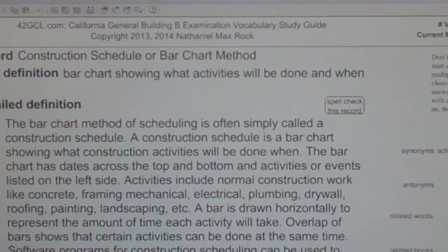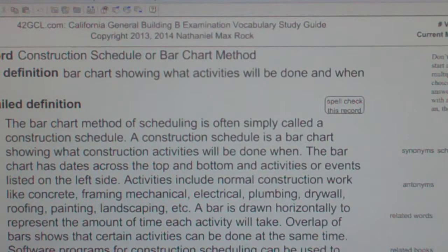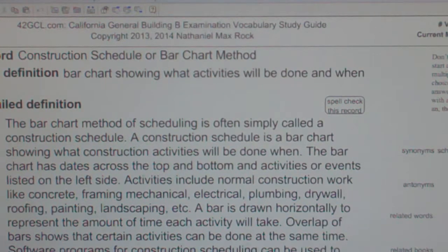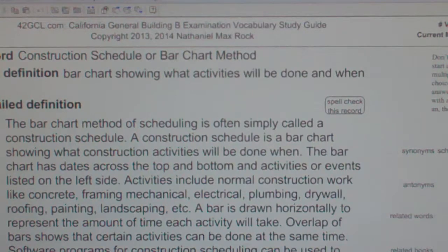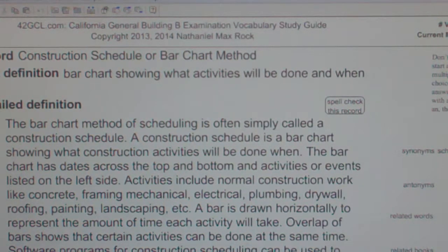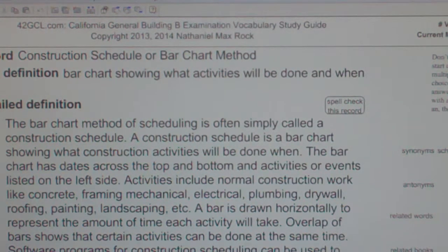A bar is drawn horizontally to represent the amount of time each activity will take. Overlap of bars shows that certain activities can be done at the same time. Software programs for construction scheduling can be used to produce a construction schedule.